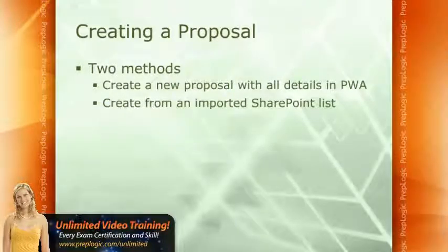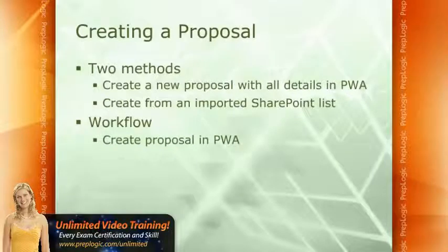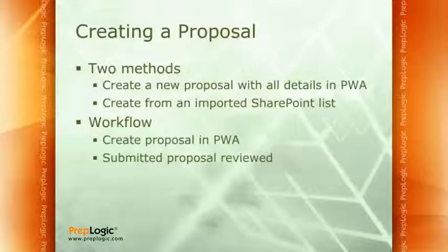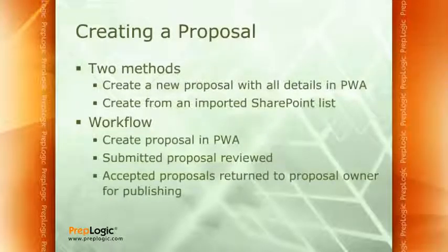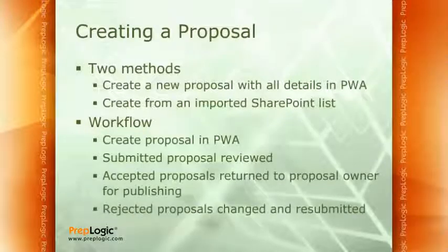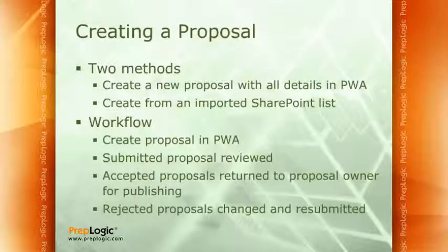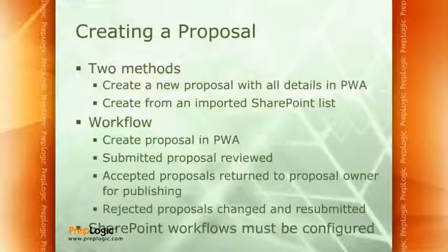There is also the opportunity to work with workflow. You'd create the proposal in PWA, submit it for somebody to review — and those people have to be approved reviewers. Accepted proposals would be returned to the proposal owner to publish. If the reviewer rejected the proposal, it could go back, be changed, and resubmitted for review. For all of this workflow to work, you do have to have SharePoint workflows configured, which is a SharePoint concern rather than the project server side.